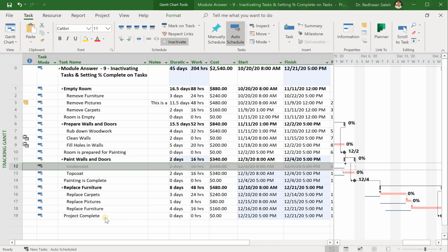In addition, when the plan is agreed and you want to start tracking the percentage of the tasks, which one has been completed or how much of these tasks has been finished. For example, 100%, which will show here next to the task, means the task is completed, and 0% means the task has not yet started.